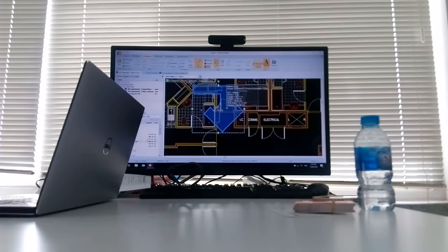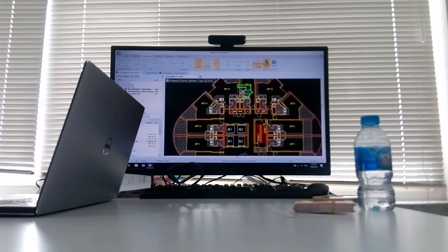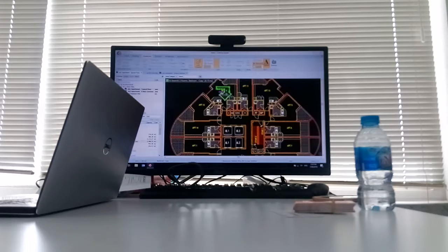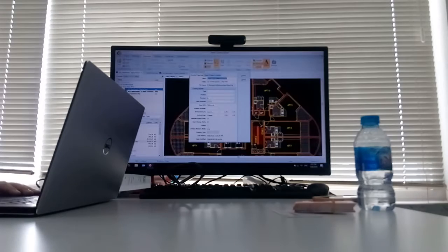So you notice that you see this area. When you try to move it inside to any place, it cannot mesh with it. Then you notice that the scale is different. Okay. So what you need to do is, you don't copy first, you need to make sure both of the scale is correct. That's why you can just double click here, make sure the scale that you adjust.